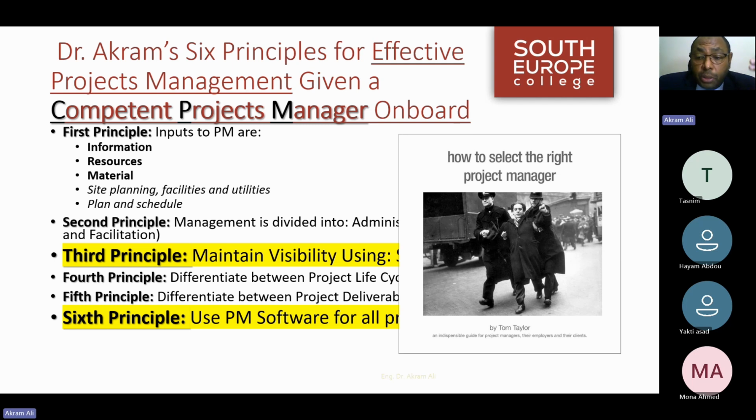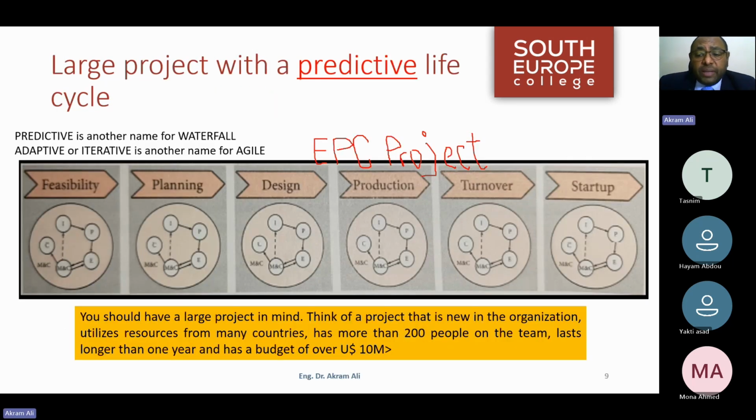And in order to produce a more accurate budget, I have to calculate more accurately the inputs into activities. So I can plan for my next 6 months by breaking down the work breakdown structure into smaller pieces. And once I have a finer work breakdown structure or a lower level of work breakdown structure, I can have a better working plan even for monitoring and controlling.